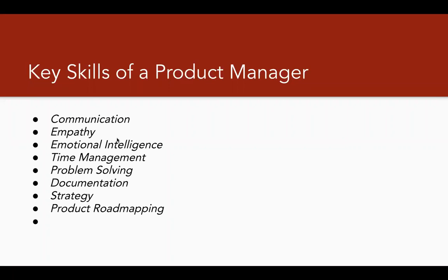deliver. So you're not responsible for saying you are going to finish in April. Who told you that you finish in April? You need to be able to go and meet your engineers and say, guys, we have this goal. When can we finish, right? If we put all the things we have together, all the knowledge we have now, how will we be able to deliver? Yours is to go and present what your team has said.